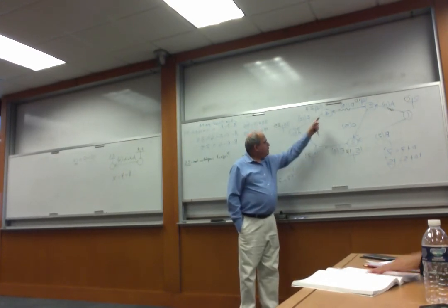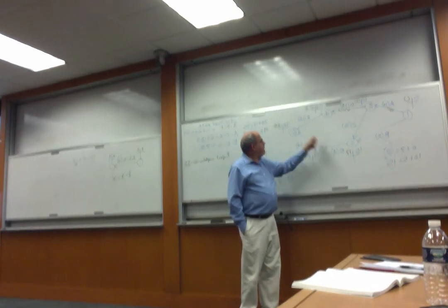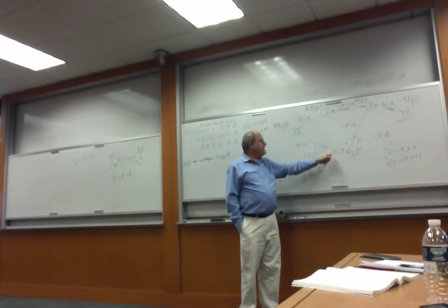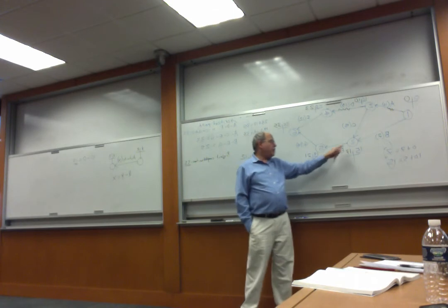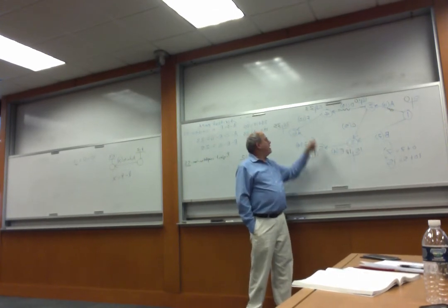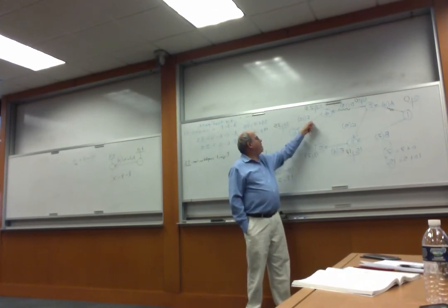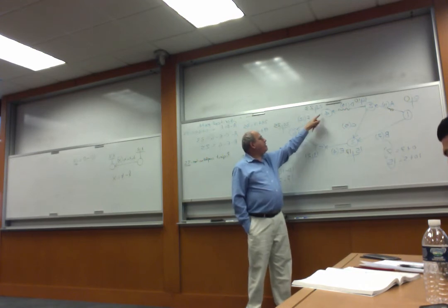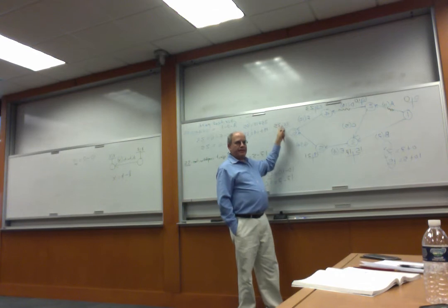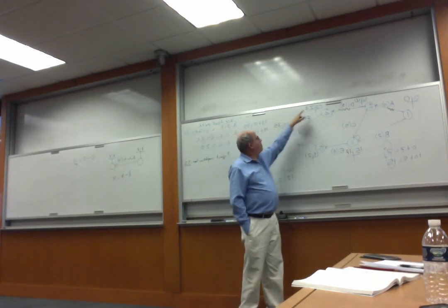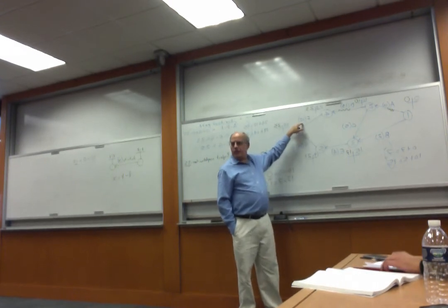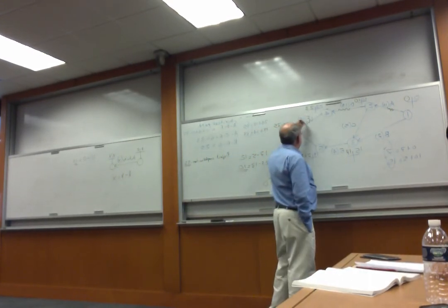Okay, where am I? E. E is not critical because it starts at 3, unequal numbers. Is F on the critical path? Yes. It starts at 4, equal numbers at 4. Ends at 6, equal numbers at 6. And the last one, 35 minus 23 is 12, which matches the length of F. So yes, F is on the critical path.